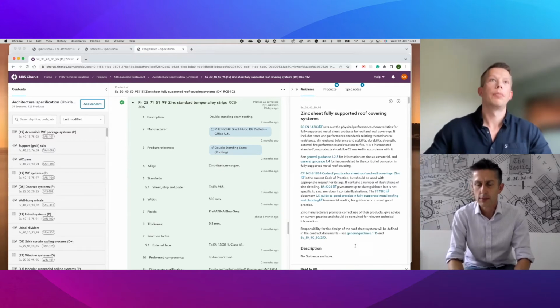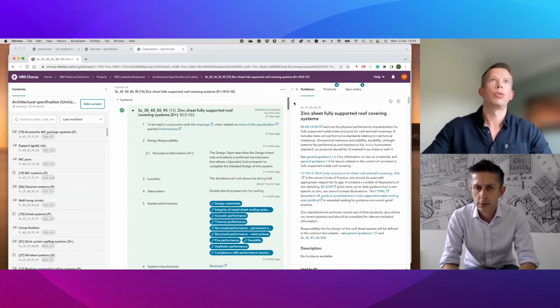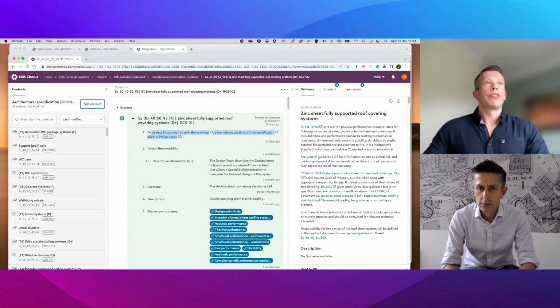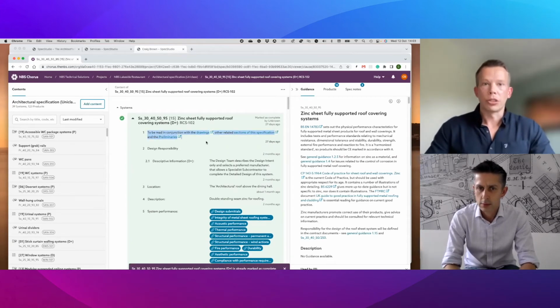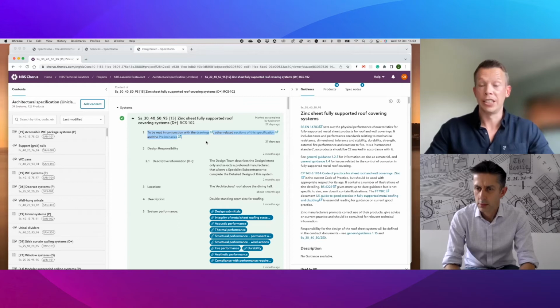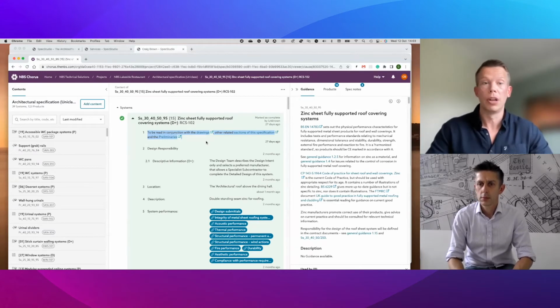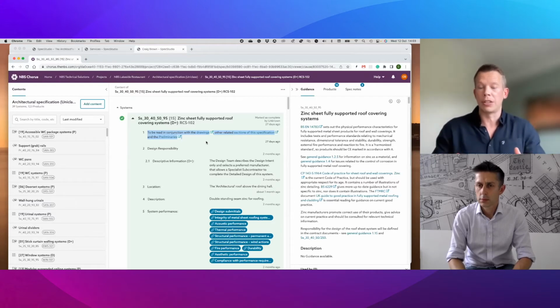Yeah, so again, within all our specifications, we always have this kind of opening clause. It's important. We see it in industry, with a number of different clients when we first start working with them, that they produce specifications in isolation, or produce sections in isolation and just send out a certain unit class section, or going back to common arrangements, send out a certain F10. But it's important that it's read with the prelims or the A section and read with the other project documentation and the design drawings, all relevant to that. So they all need to be sent out as one.